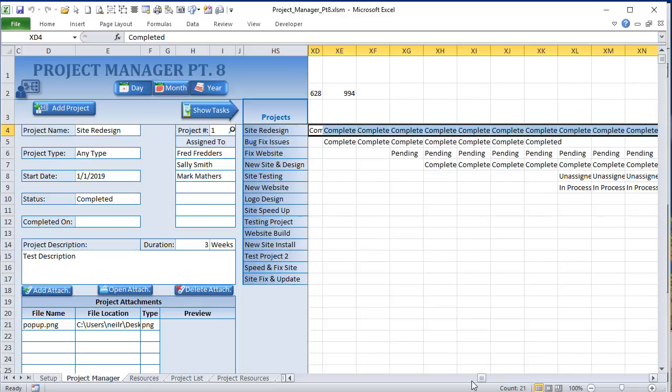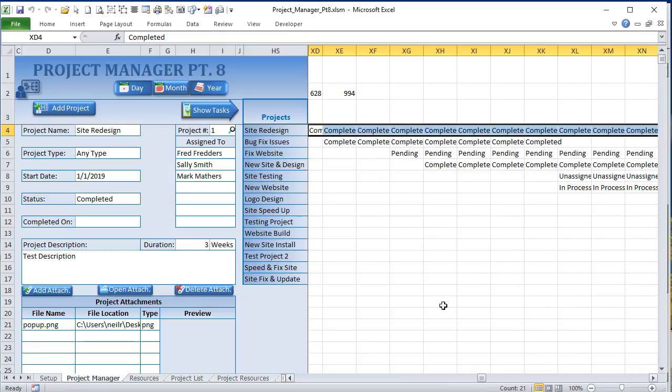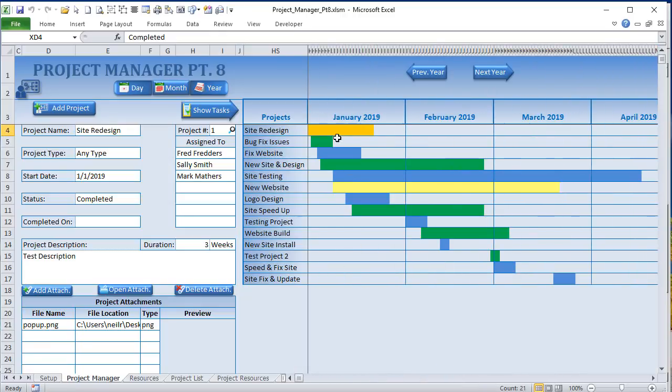And I want to place that status exactly for all of the days of the job. That's going to give us our conditional formatting to color this. In fact, when we've not selected it, it'll color green. So green being completed for all the days over. So we need to do that. So that's going to be run.